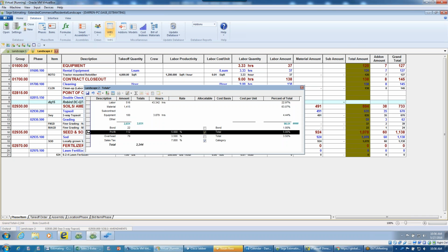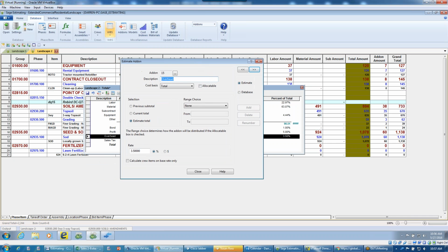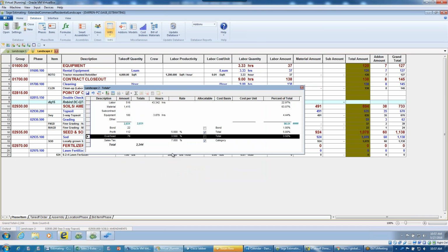Most definitely. Yep. So if you look at it, and I want to go ahead and edit this add-on, here's the flexibility of what we look at. Maybe we wanted to go in and break it out by category and say by labor. We can even go into setting up WBS codes and say, I only want to go from this WBS code to this WBS code, or whatever it may be. You can do that. A to and from, taxable only, is it a dollar amount, is it a percentage? It's up to you. But a lot of capabilities. We can do it on the hours, total, bond, lump sum, other add-on, as I mentioned, even subcategories if you get to that level, which I don't find a lot of my clients doing. But yeah, most definitely you can categorically mark up whatever you need to do.